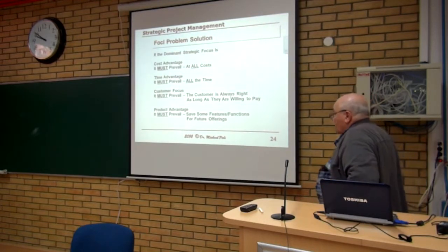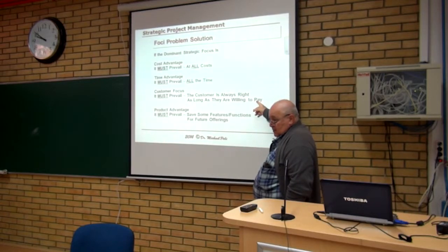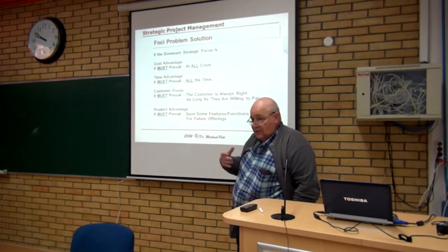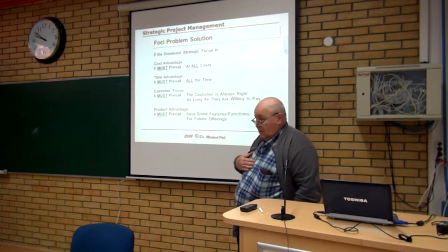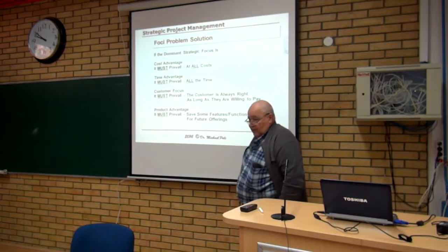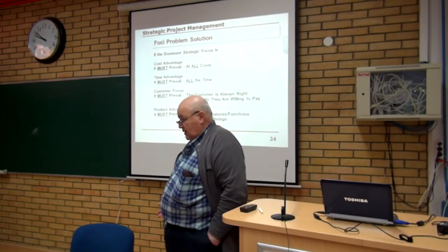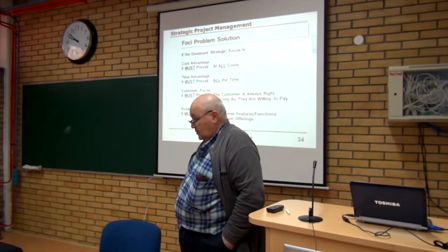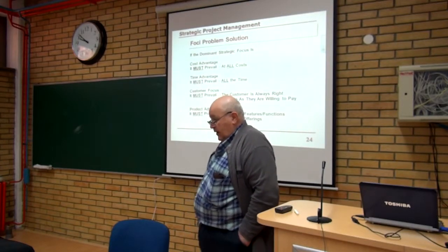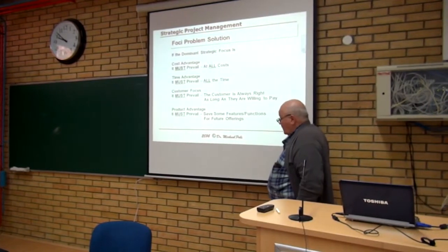Customer focus, the customer is always right, as long as they are willing to pay. Remember, I'm talking to one customer, and I'm doing the project for them. I'm essentially customizing it for them. So what am I doing? I'm giving them service. So the thing is, they're right, as long as they're willing to pay. But if they ask me to do something that's going to cost me $1 million, and they're only going to pay me $200,000, how much money did I make? Minus $800,000. I'm not doing it. Customer may be wanting it, but customer's not right. I have certain obligations to myself and my company to stay within reason. So I'll do stuff for them as long as they're willing to pay for what I'm doing.